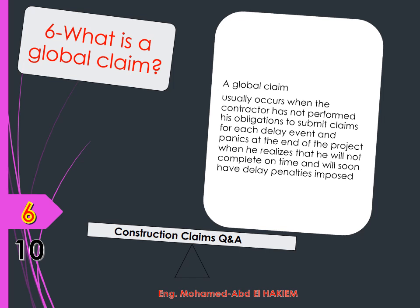Question 6: What is a global claim? Answer: A global claim usually occurs when the contractor has not performed his obligations to submit claims for each delay event, and will not complete on time with delay penalties looming. Basically, in this situation, the contractor cites all delay events that have occurred and attempts to claim an extension of time to the completion date that he achieved.